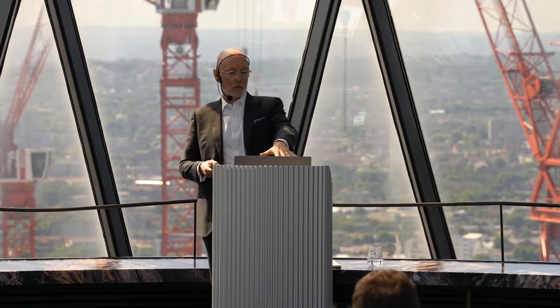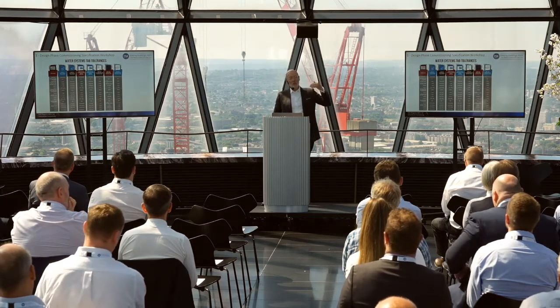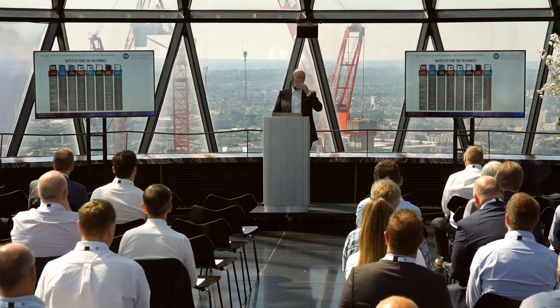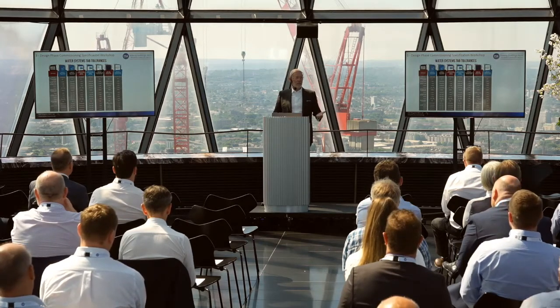And the problem with that, even in the UK, there are different tolerances for systems, right? So this is just an example on balancing water systems. So all these standards have different tolerances. So again, it is on us as commissioning managers to guide the client on what to include and what not to include. If you have a tolerance that's too much, you waste time. If you have a tolerance that's not good enough, then you don't get the performance out of the system.